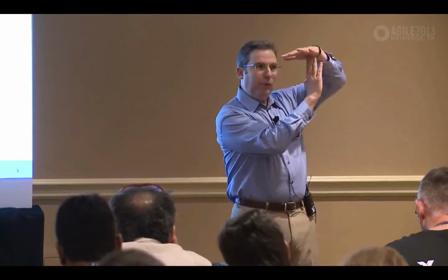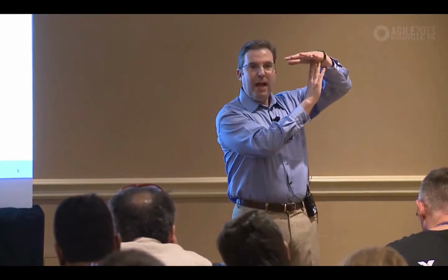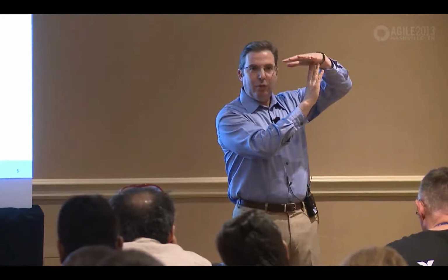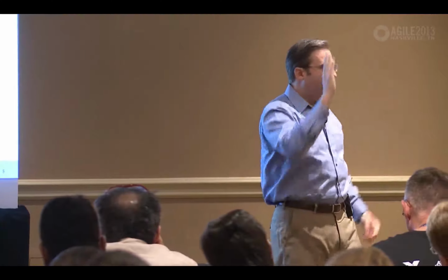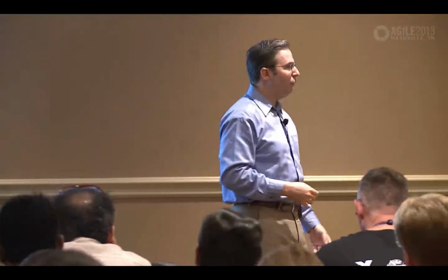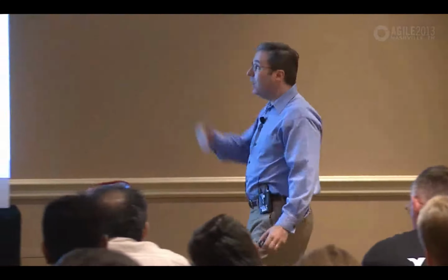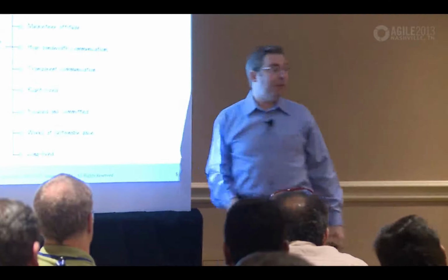And if I had people with T-shaped skills, if I ever had an overabundance of work in a given vertical area and only had one person who could work in that area, then obviously I could run out of capacity during that sprint. If I have people with T-shaped skills, it enables the behavior we want, which we can call swarming. Those people could swarm onto the area of too much work and relieve the bottleneck. So I'd like to staff my teams with people with T-shaped skills because that'll also help enable a musketeer attitude. You know, all for one and one for all.